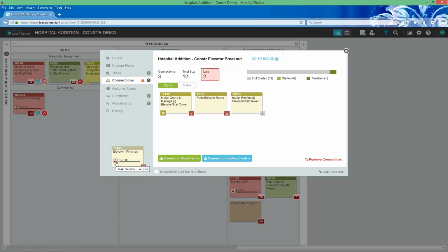We can figure out who we need to talk to. We can have a quick conversation, and we can go in and say, oh, okay, this material didn't show up on site today, and so this particular activity might be delayed by a day or two. But we can then take the resources that we were going to devote to those activities and move them over here, and maybe pull in this other thing that we were going to work on tomorrow or something.